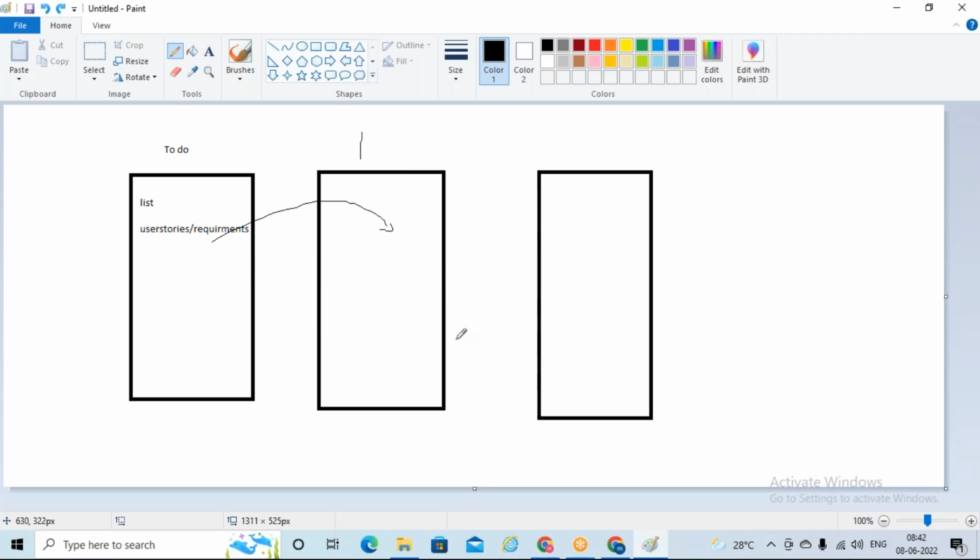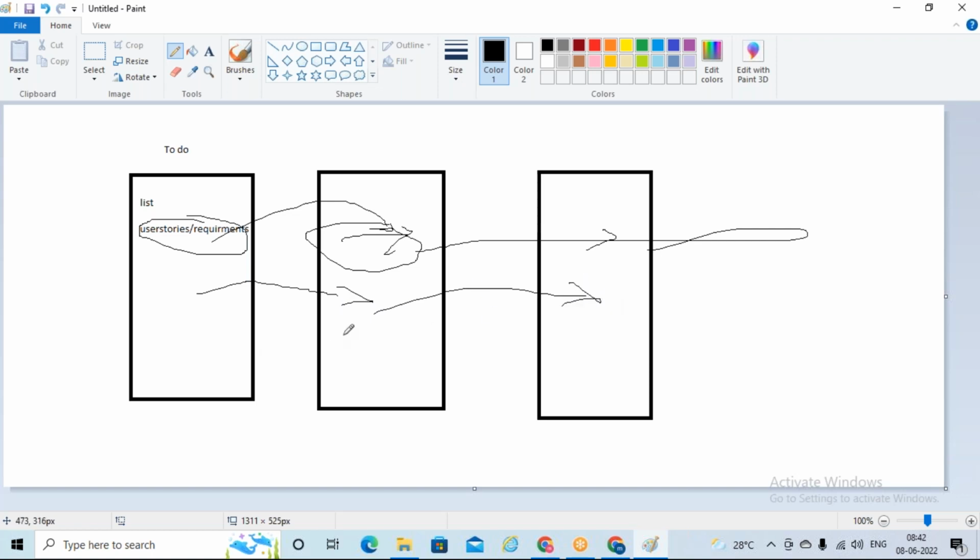In the Scrum process, we plan sprint-wise, sprint of 3 weeks, sprint of 4 weeks, like that, right? But in Kanban, once this requirement is over, we take the next one. Parallelly the development and testing go on and it moves to the next stage. Once it is done, again one more requirement will come into this bucket. Like that, it keeps on going in Kanban.